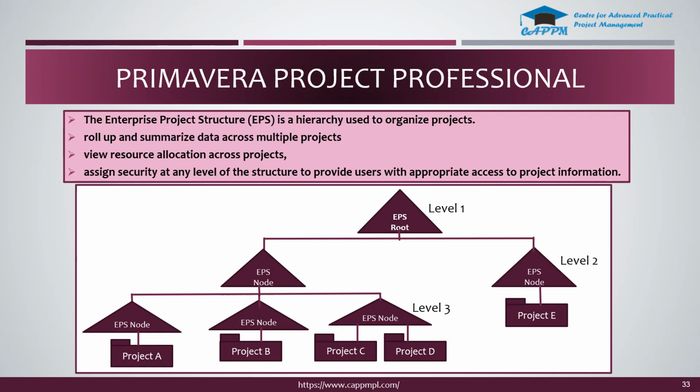The main benefit of using this EPS is that it is used to roll up and summarize your data across multiple projects. You can also view the resource allocation across projects, and we can assign security at any level of the structure.